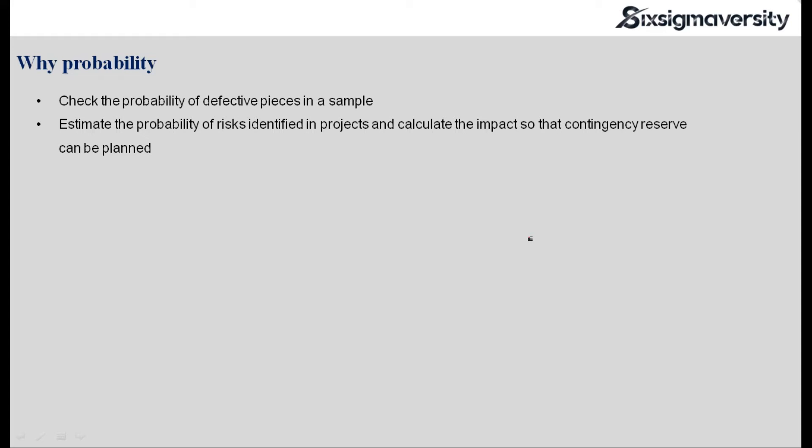Another example could be when project managers identify a list of risks that might impact their project schedule or project cost. They would look at each of those risks and assess the probability of each of those risks occurring, and when that risk occurs, what is the total cost they will have to incur if it is a negative risk or a threat that might happen to the project. So that is another practical use of probability.